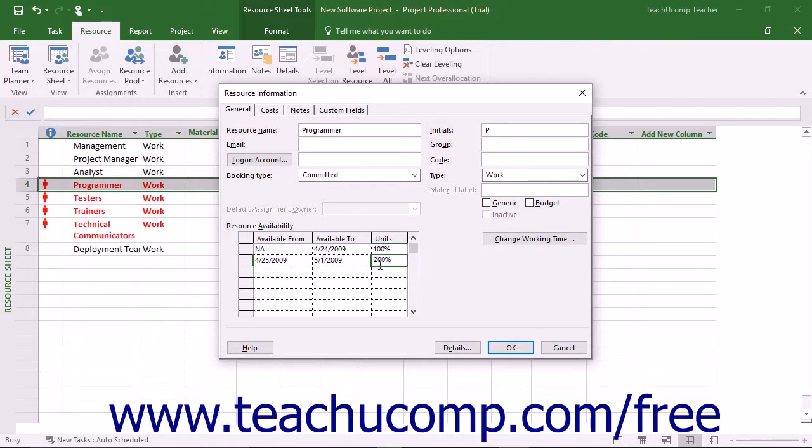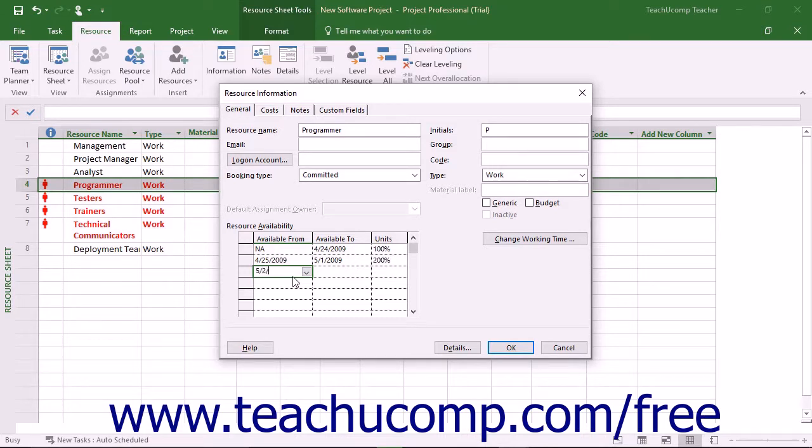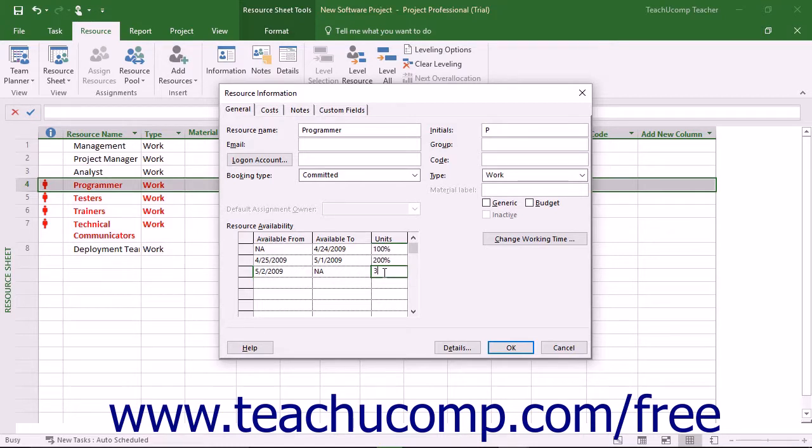Then repeat this step for the third week, selecting the desired effective date to start, and setting the units to 300% for the remainder of the project.